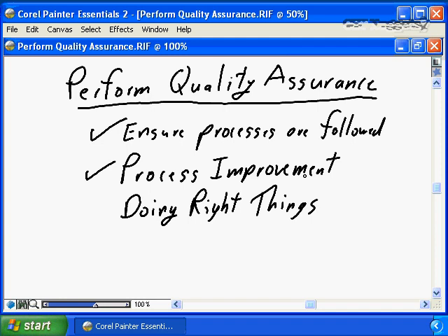But when team members find better ways to do things, they need to feed it back into the quality assurance process, put it through a proper process improvement process so that it can be reviewed and evaluated, and we can say, yes, this team member has in fact found a better way. Let's implement that project-wide so that all future deliverables, all future components for our project are delivered using this better process, as opposed to one hero.